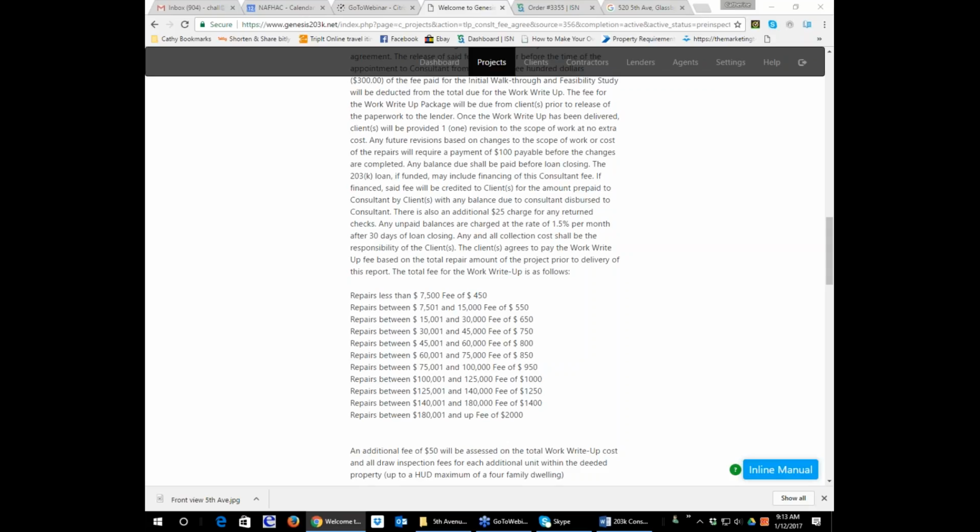The reason I'm emphasizing this is, with most things that I do, I emphasize things that I found people have had problems with. One of our very dear members, Vince Vargas, and another member didn't require payment at any stage because the lender requested that they take payment at settlement. Well, it is now 3.5 months later, and it looks like the job is going to die. So how is he going to get paid if there is no settlement? You don't. You should always require that payment is required at the time of report delivery or before. At or before report delivery is the required time frame for payment.